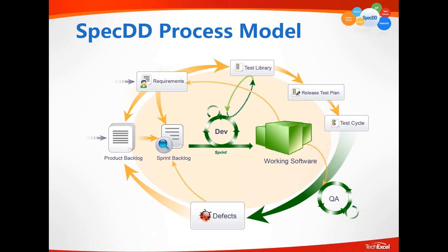But the Agile team not only converts the committed sprint backlog into working software, they are responsible for further improving the requirement. As the working software becomes available, people will recognize the initial requirement is not complete.